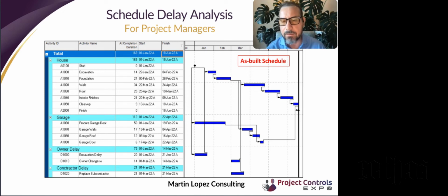And it is time-consuming because there are many documents that now you're searching. Typically, you search for meeting minutes, data reports, payment applications, monthly updates, emails, drawings, RFIs, and any documentation that can assist to tell the story of what happened on particular delays. And in this way, you can also determine who's responsible for delays.